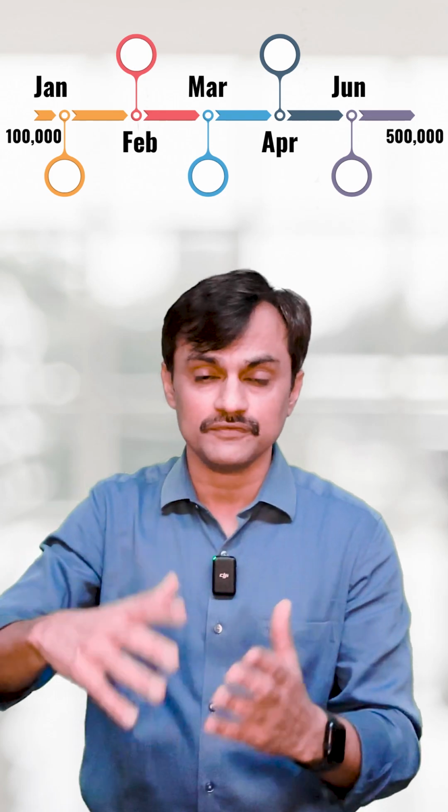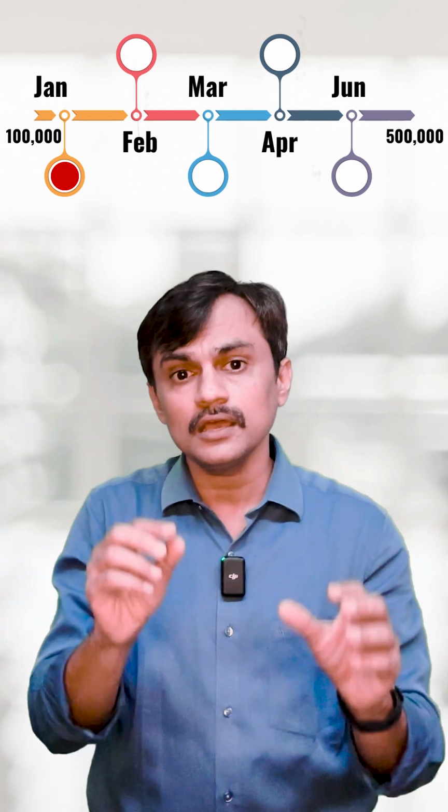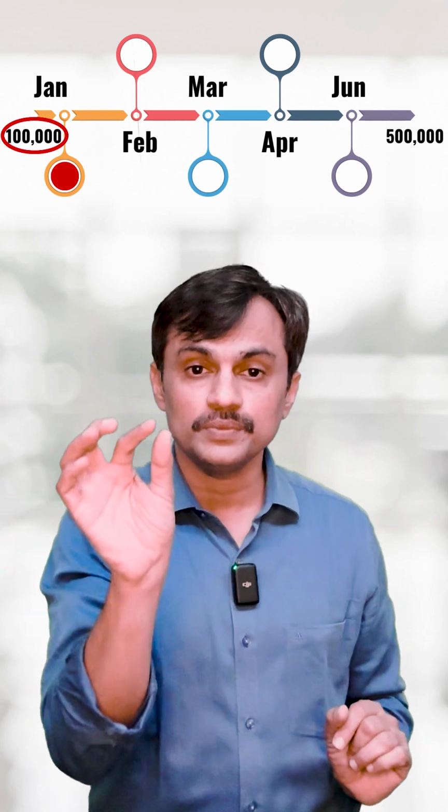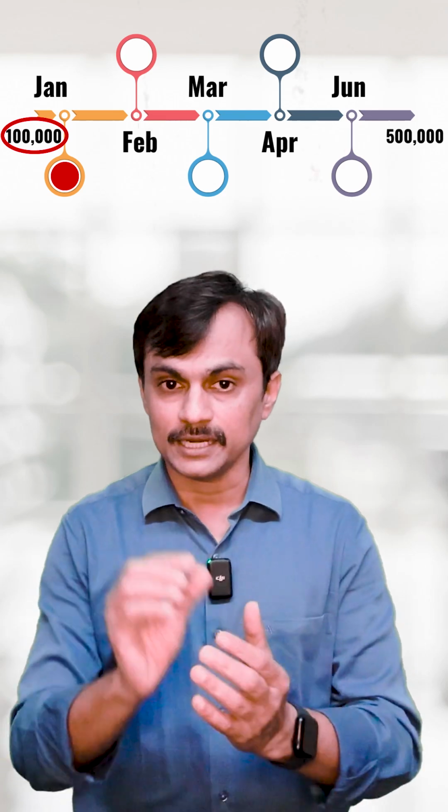Say I'm tracking my variance in the month of January, and my project budget is 500,000 overall. My budget at completion, let's use the specific language, could be 500,000, but I am tracking the budget in January. I am not comparing with that 500,000. I have to compare with the number which is expected to be spent by January. So my cost baseline for that moment is not 500,000, rather the number expected at the time that particular tracking is happening. So cost baseline is a time-based budgeting number, not just one number.